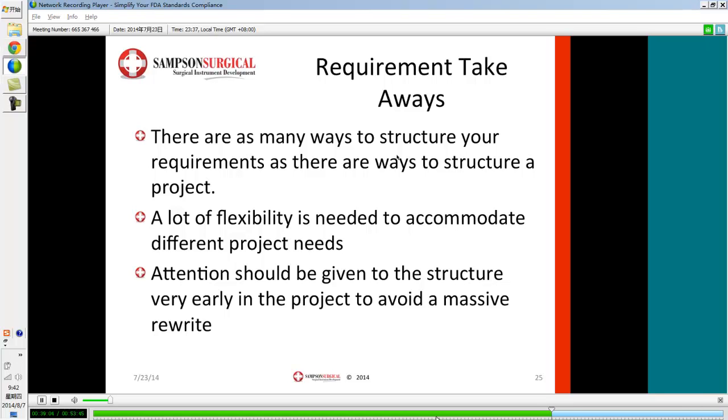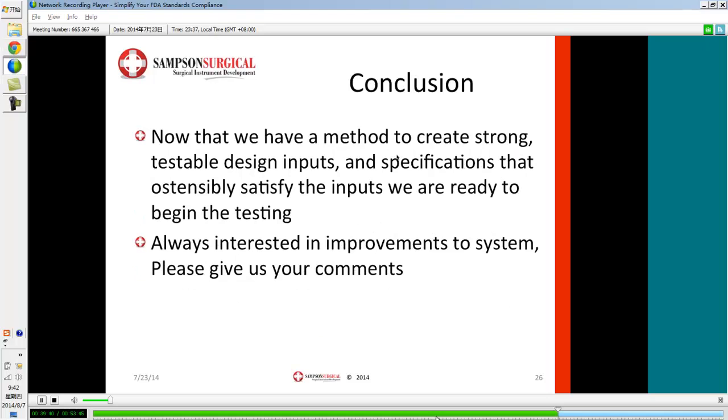And just for a point of reference, often people put this off towards the end of the product. You can imagine if you've defined everything as a product requirement, now you want to break those product requirements up into 15 different types of product requirements, it's going to require redefinition of the work items, and it can be a lot of work. If you're in a really big product and you have 10,000 requirements, that would take you some time to get through. So I'd suggest a very early view of getting your structure put together.